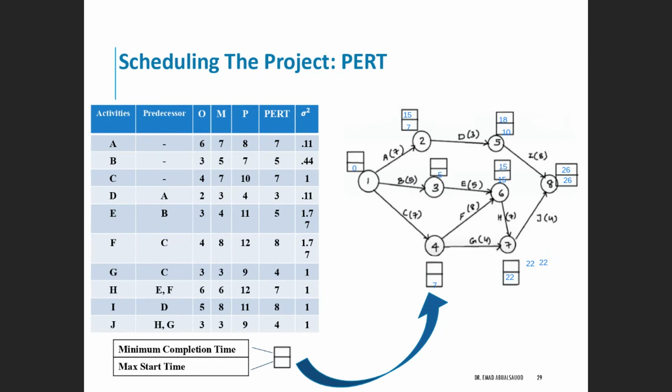Now we continue with the subtraction. We subtract the 15 minus the 5, and that will give us the 10. So we'll put 10 here. Or the 15 minus 8, 15 minus 8, that will give us 7. So we put the 7 here.